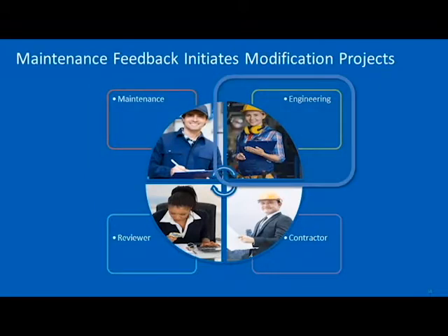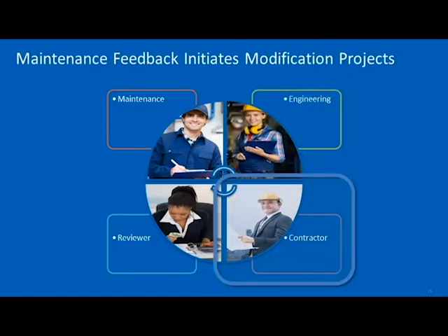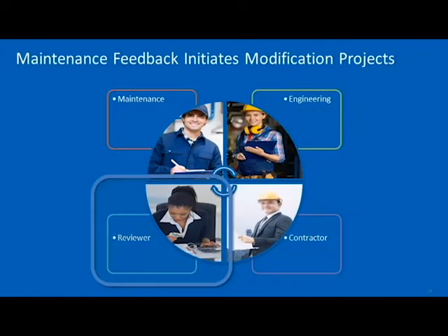Then, engineering will review the request and delegate the drawing changes to a contractor. Once the contractor returns the updated drawings, engineering reviews and approves the drawings. The updated documents now become available to maintenance and the rest of the organization.